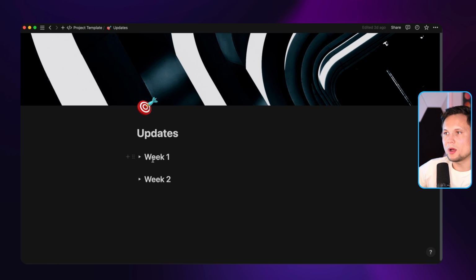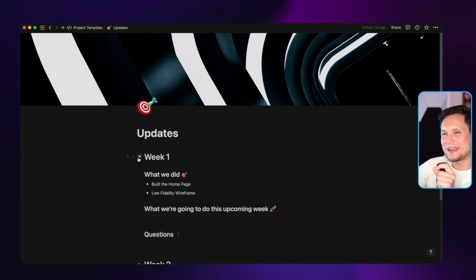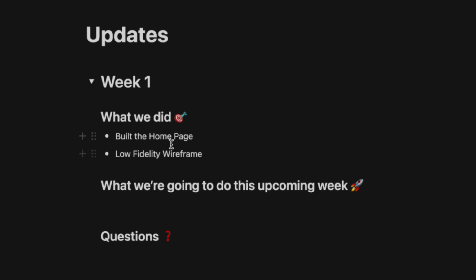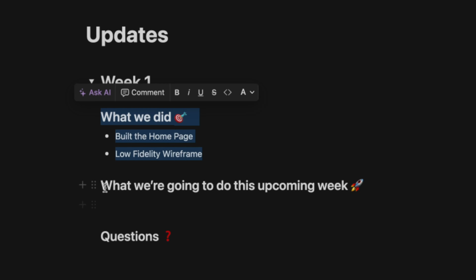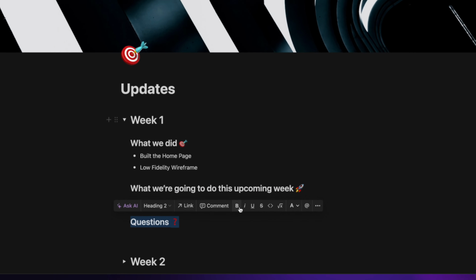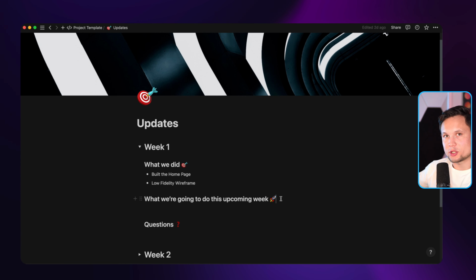The second thing is updates. Updates is really important as well, because in here, every single week I have a meeting once a week with the client, and we talk about 3 things. 1, what did we do? 2, what we're going to do this upcoming week, and any questions that we might have. Again, this is just great for documentation for yourself.